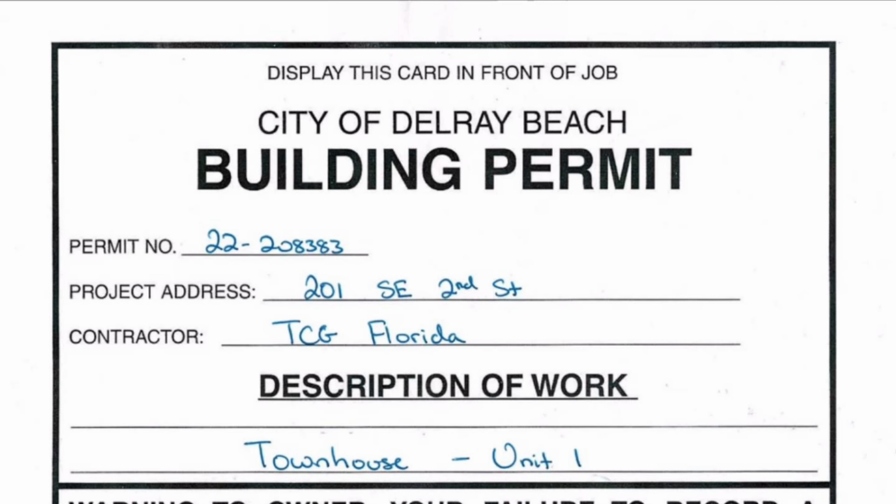However, we were allowed to break ground early at the beginning of July because everyone knew the permits were being issued. So the first thing we went to work on was getting a substantial water supply connected to the site, so we could start compacting the ground to prepare for putting in the form boards that will hold the concrete we pour for the building slabs, but more about that later. But first we have to get water to the site in substantial quantities.